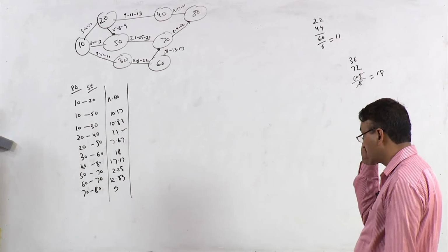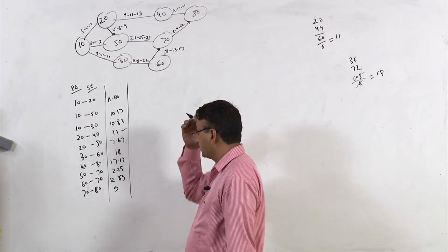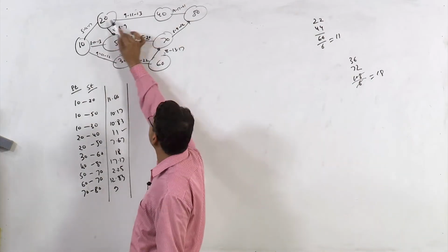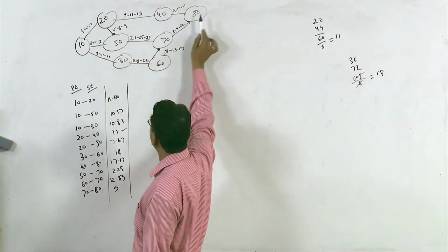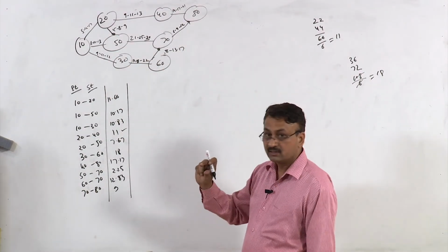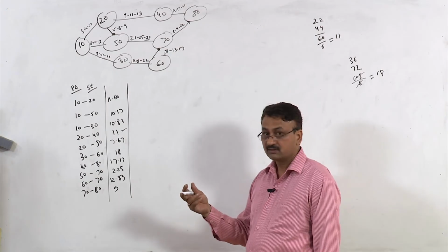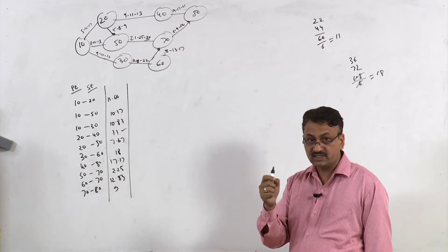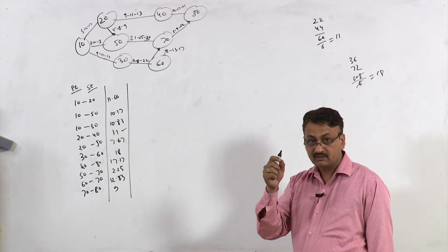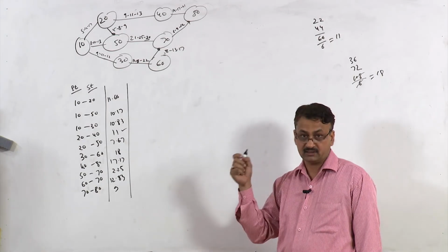Either you can do this, in fact you can come up with different paths over here, right. So you can have path A, path B, path C and path D, and just do the summation of all TE values, and take only those which are on the critical path and find out variance along that critical path.